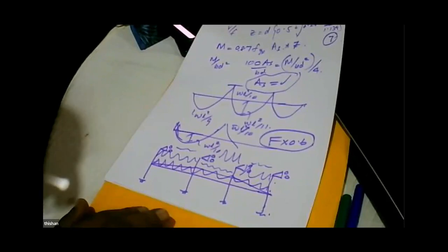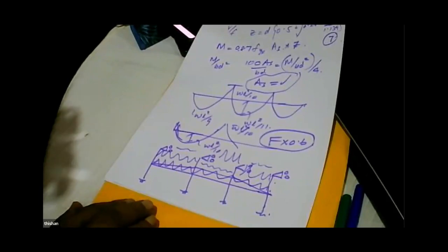Sorry, I got that wrong. Say the whole project is 5,000 million. The structural cost is 2,000 million, and the structural engineer is going to charge 2% of that. That is 40 million. So the structural engineer is going to charge 40 million, right?